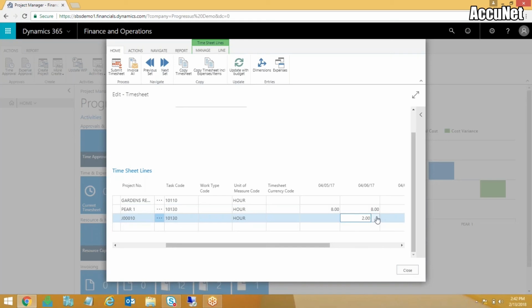And those are assigned at the time you post the transaction. So we don't have to run a process like you would in SL where you'd have to run allocator to identify those rates, which also means that you can find out what your billable amount is without running a process at the end of the month. So anytime during the month, you should be able to tell what your billing value is going to be, and I'll show you that here in a moment.